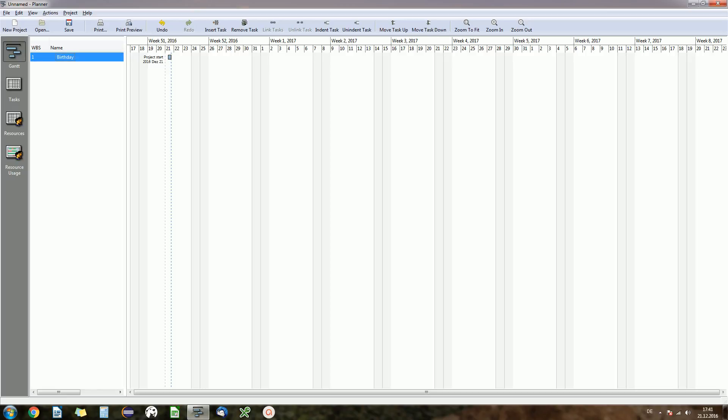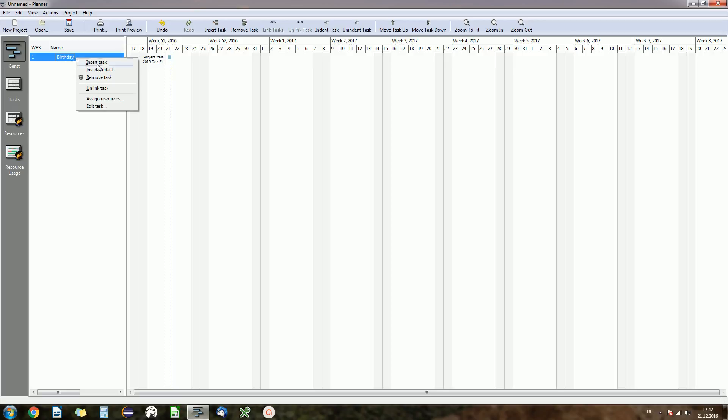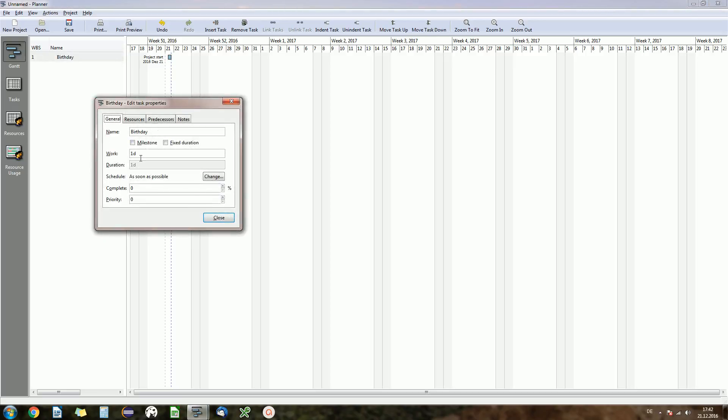Of course you can plan anything you like. The default setting is that the task will start today. So today is the 21st of December. That's the project start. If we want to change the duration of the task birthday, we can again make a right click and edit the task and set the work. We can also set that to a fixed duration. We have to check the fixed duration checkbox if we want to do that, but work is also okay.